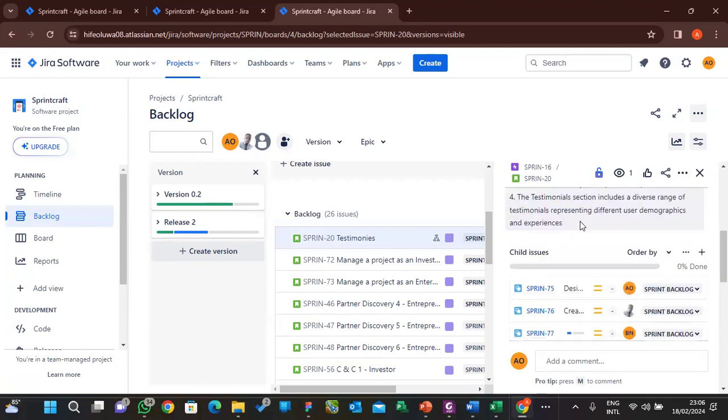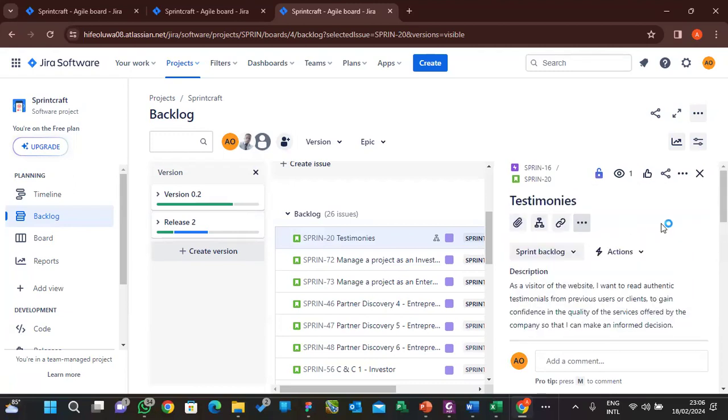Then there are other factors that they will consider. Each of them will vote. It's actually by voting. They don't do average. That's why I wanted to open that planning poker. In planning poker, you don't do average, please. It's always a consensus agreement whereby almost all of them will have the same number.